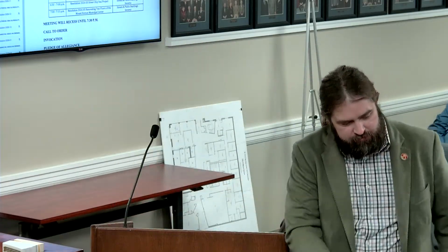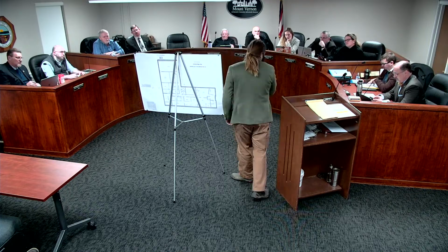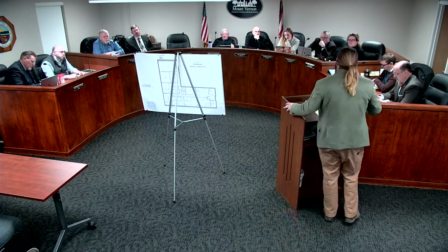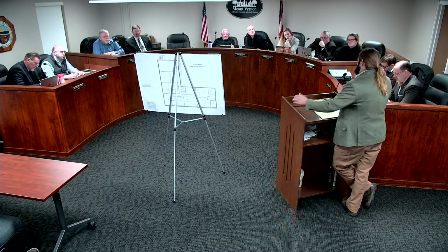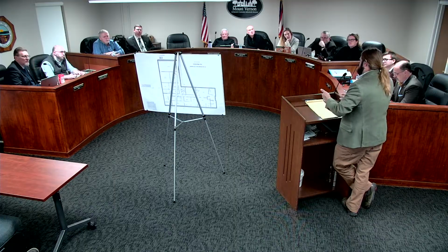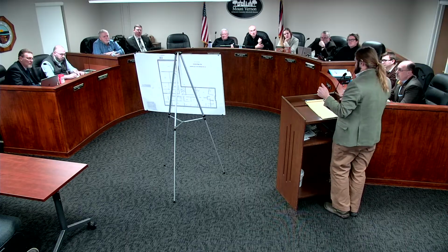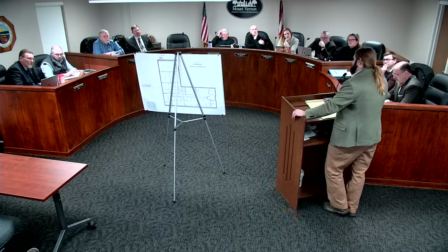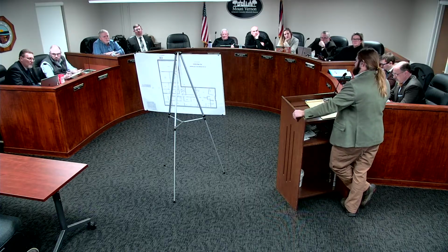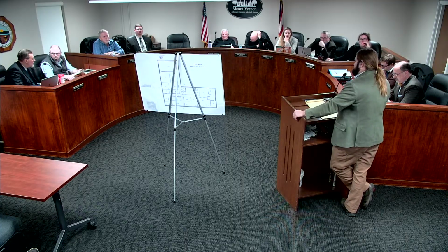Go ahead. What's the road on the south, on the very bottom there? Glen Road. This is one we put in as an option, basically. We have annexed part of Glen Road with the Nazarene University and the school. When the township chip sealed last year, they asked us to go in with them, but we've realized there are 4 culverts that are in poor condition. So that section would be contingent on us getting those culverts replaced before we do the program.